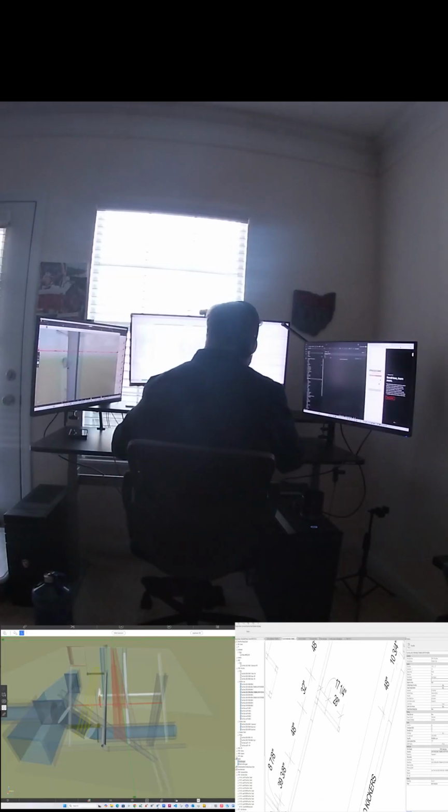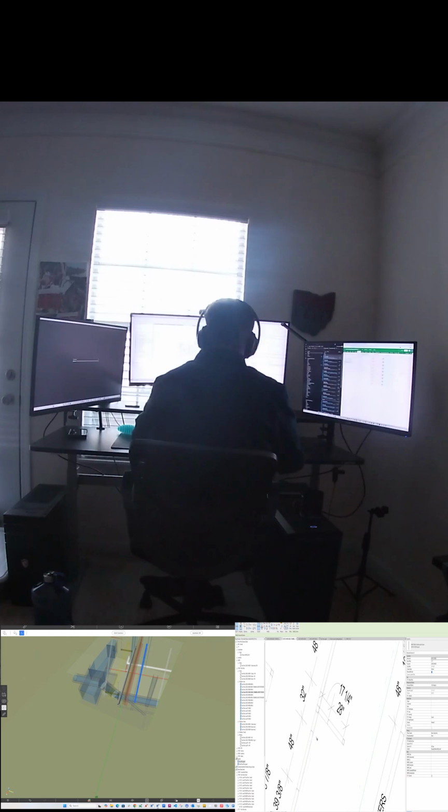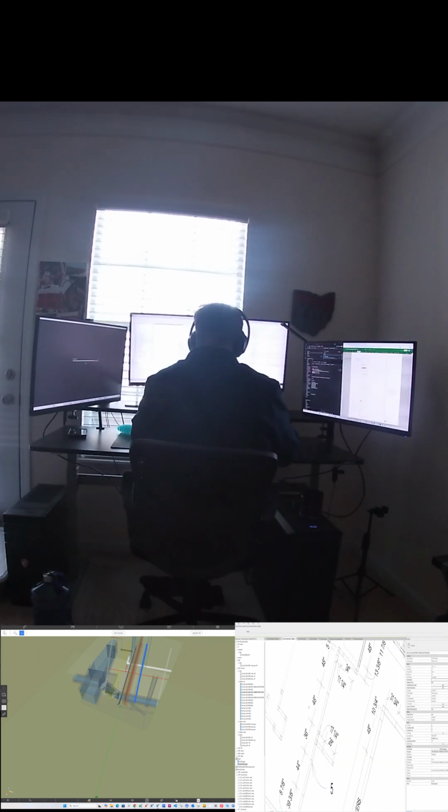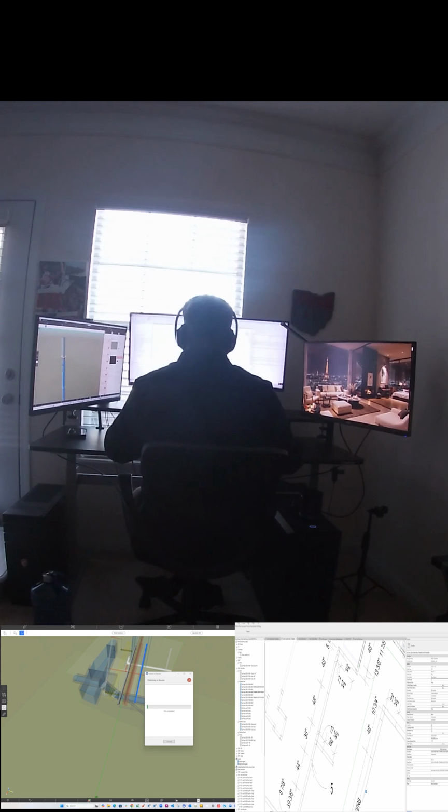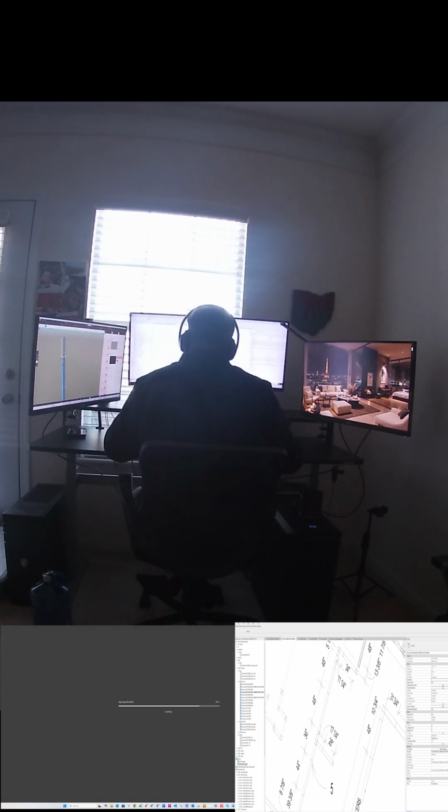which is why we do coordination, which is basically everybody 3D models their scope of work. The software varies greatly. We import them into a collaborative location, and we clash them together. And then we see what issues we have. Can you not get access to this? You're hitting this. I can go on and on about everything, but that's what we're doing today.